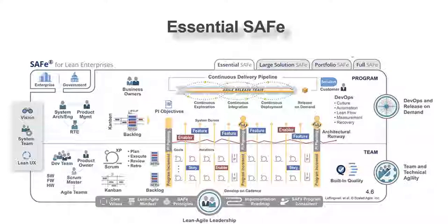make one big team. This big team would be monitored by certain roles, and hence it would be easier to run that big team. Now, what is that big team? It is what they define as an Agile Release Train, ART. So an ART would have around 5 to 12 teams working on the train. You would have 50 to 125 people working on delivering a functionality or piece of product. So that's what essential SAFe is all about. It becomes easier to get into this scaled agile world by first adopting essential SAFe.